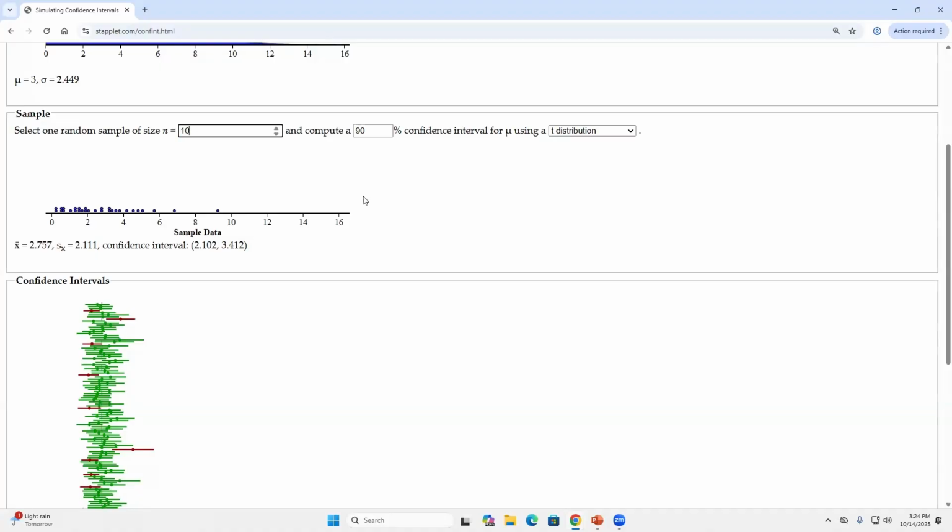All right, so just to put it back in the context of the project manager, let's say that Alex says to his team, okay, we've got to dig up data on similar projects that we or our colleagues worked on and base our estimates on that. And they come back and say, hey, we found 10 projects that we've done before that we have data on. That's your sample size of 10.